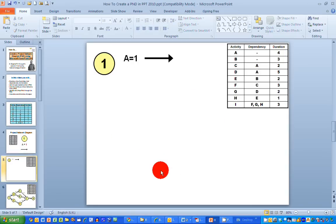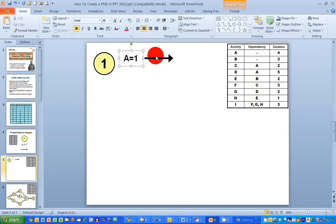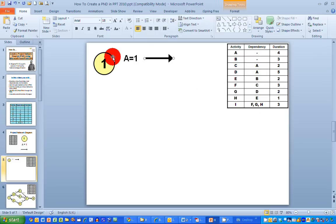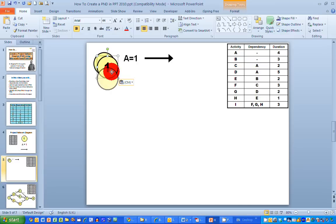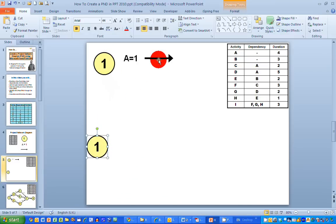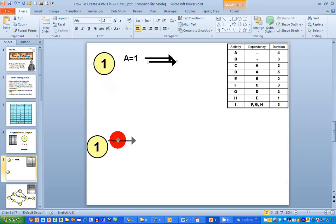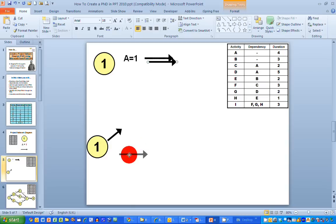I'm moving to the next slide with free space to draw. I have the same table in the top right-hand corner showing activity names, dependencies and durations, and my three tool items in the top left. I can see from the table that the first two activities, A and B, have no dependencies, so they can both start at node number one. I'm copying and pasting a circle representing node one, then copying and pasting two arrows to represent activities A and B.